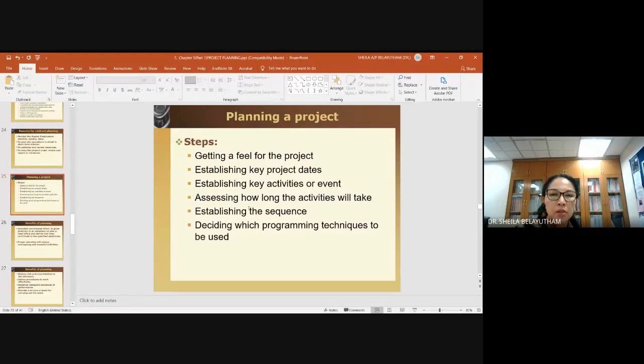Okay, all right, so next, basically you need to establish the sequence of the activities. You have so many activities, hundreds of activities. You can't complete all finish to start. It's impossible. It will take forever to complete. So you will need activities which start together, and activities that finish together before you start the next activity. So this is where your sequencing comes into the picture, and this is where we are going to touch on the calculation part of the planning too.